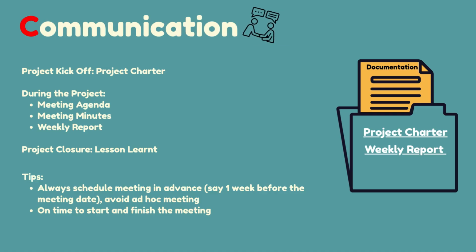At project kickoff, you will need to have your project charter ready, or at least have the objective and timeline filled. During the project, we suggest you send a meeting agenda before each meeting, send meeting minutes after each meeting, and a weekly report on a fixed date every week. For example, Friday, end of day. At project closure, you might want to prepare a lessons learned document too.